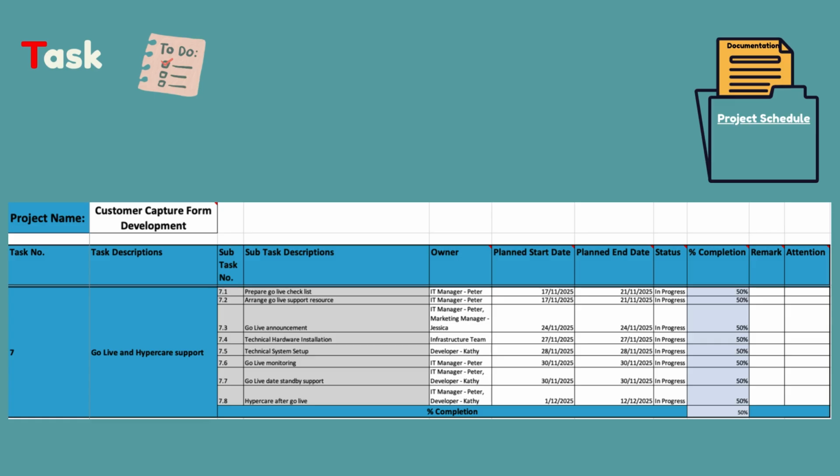Talk to your team and consult them on what needs to be done in order to move the changes to live. Prepare a checklist for all these tasks. Arrange necessary resources to support go live. Send out communication by email about your arrangement for go live. This includes the exact date and time, any action needed on the user side to use the new function, etc.